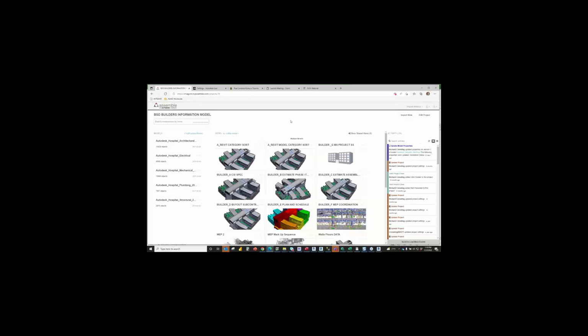I call that elective surgery. And I wouldn't do that to a copy of the model that is going to be utilized for fabrication or document production. I would save a copy of that. Designers typically are not looking for extra work, and contractors really are responsible for the means and methods.